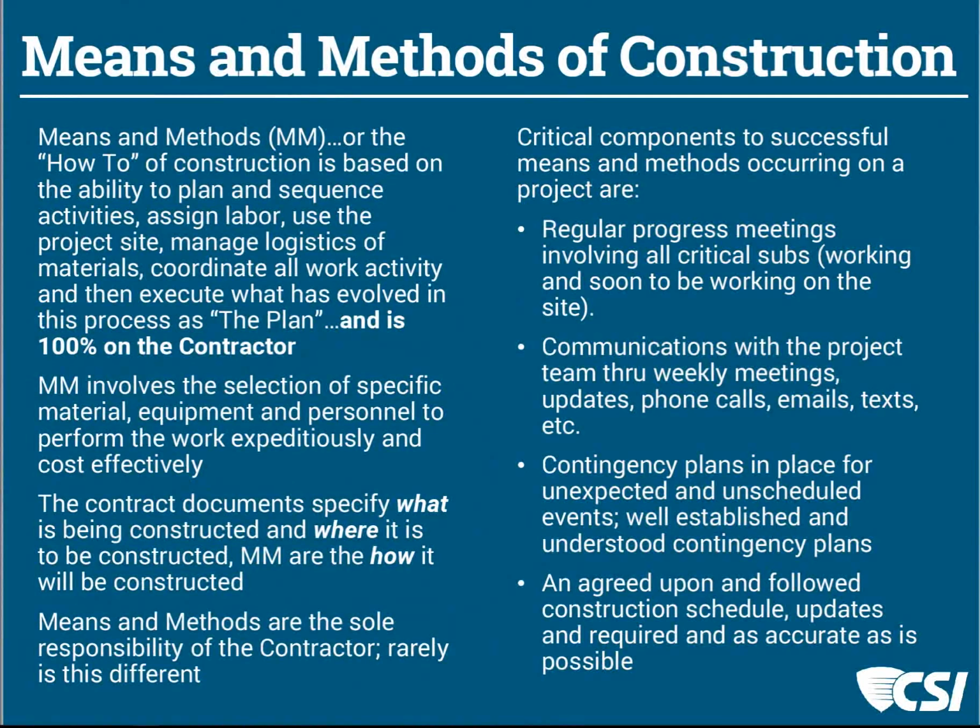The contractor also has to be sure that they have contingency plans for things that are unexpected. I guess the most obvious one would be weather. So they have a construction end date, and they have taken into consideration normal weather patterns for an area, and they've got to have plans for being able to overcome any impact that they might periodically have in the construction schedule.